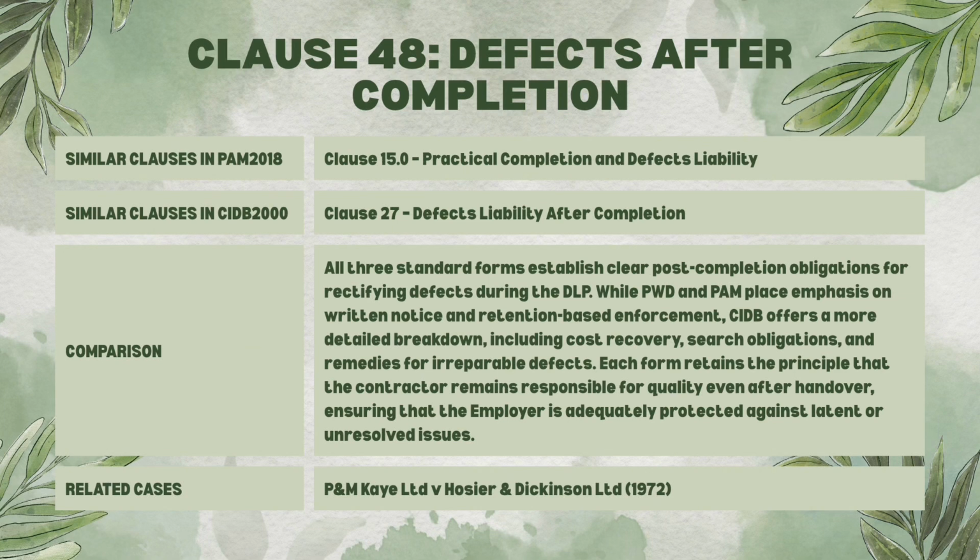However, the original contractor argued that they were not given the chance to fix the defects. So the issue here is, does an employer have the right to recover rectification costs from the contractor without first giving the contractor the opportunity to fix the defects? The decision here is the court ruled in favor of the contractor. It held that where a contract includes a defect liability clause, the employer must first allow the original contractor the opportunity to make good the defects.